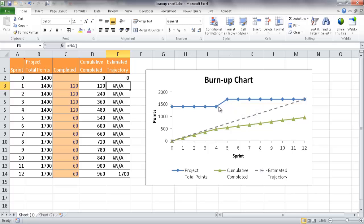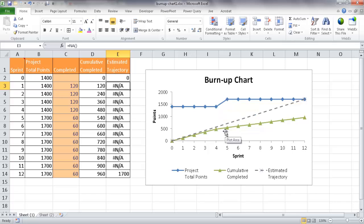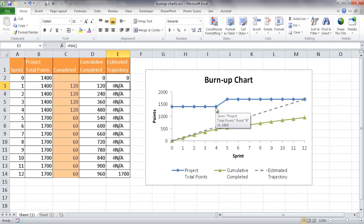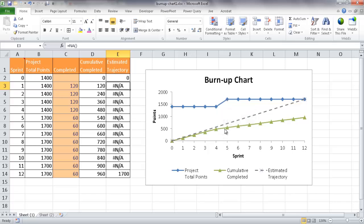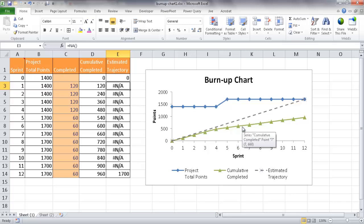They got put into the project. And that's why the amount of points have gone up. It gives stakeholders a more broader picture of the project team's work because now that we would understand since maybe a new requirement came in and the amount of points have increased, maybe we should look at this cumulative completed line and give it some consideration when we see that line start to go down.